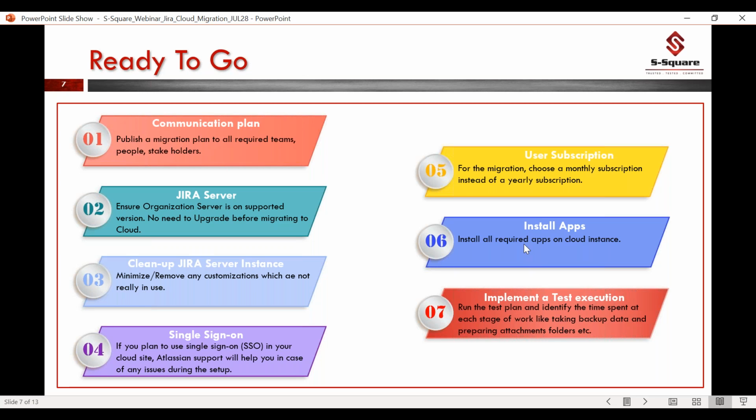So prepare a communication plan, which always includes who the focal points from projects are, who is in the testing team, the escalation matrix, and who the DB admins, network admins or JIRA admins are, all participating in the migration activities. Then circulate it again to the entire set of users.